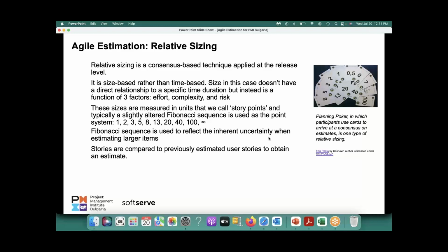But the idea is that in story pointing, you're using story points to do relative sizing, and still it is not hours or days. Okay, so most of the time, because we are all project managers and we come from that background, it is difficult to have this concept or mindset in mind. So I will simplify that for you. Think about complexity and risk, and then you can say, okay, my one story point is approximately if I can finish it within 2 days. I'm just giving an example. You can use other values.